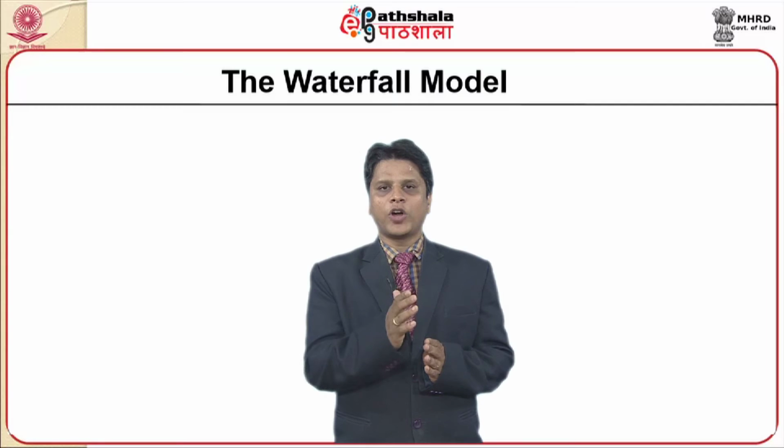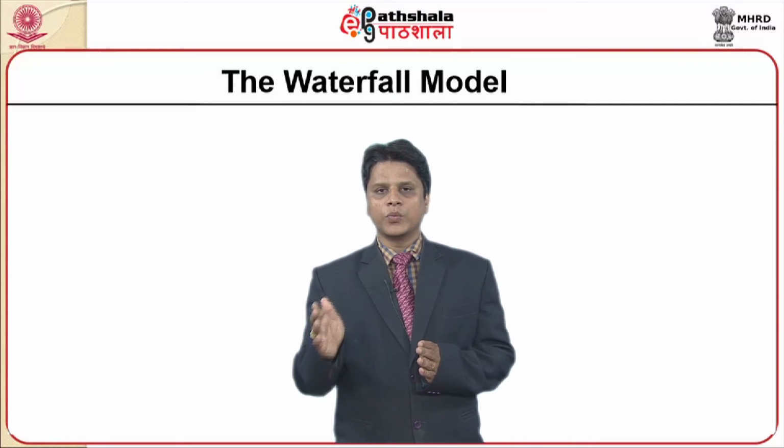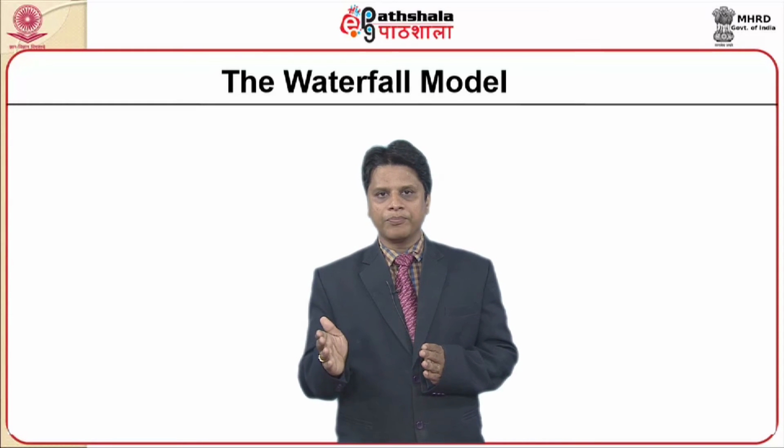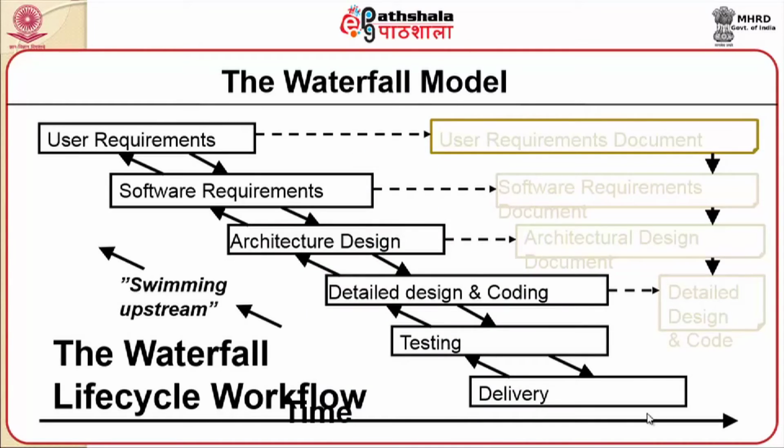So we can put it in very common terms. This particular waterfall model goes through a phase called define before design, which means if I'm about to design, I should have completed my definition before. Likewise, if I'm about to code, I should have completed my design before. So this is one of the nicest things that the waterfall model has suggested. That is the reason why for most of the real-time projects that we are about to develop, if it is not very clear, if we are not knowing the procedure of how to develop, we follow this waterfall model in detail.